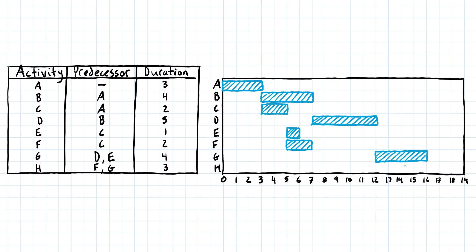Activity H can't start until both F and G are finished. F finishes at the end of the seventh day, and G finishes at the end of the sixteenth day. We can't start H until both are done, so we start after the sixteenth day. Activity H is three days long: one, two, three — taking us until the end of the nineteenth day.